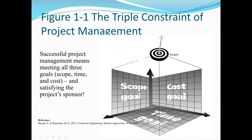This diagram shows the three primary constraints of any project: scope, cost, and time. The scope goal must have a boundary. If the scope increases and we have scope creep, it affects the costs — costs may go high — and it affects the time — it may take longer to complete. Successful project management means meeting all three goals: scope, time, and cost, while also satisfying the project sponsor.